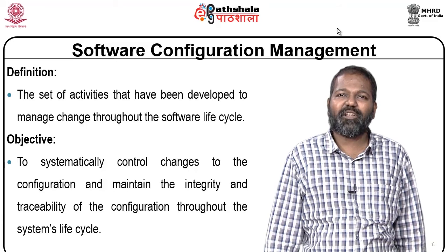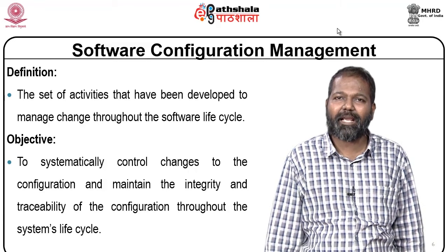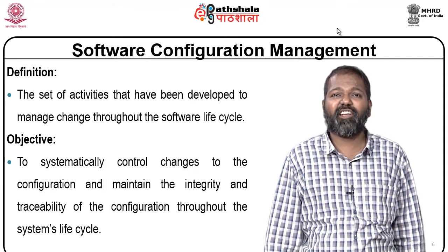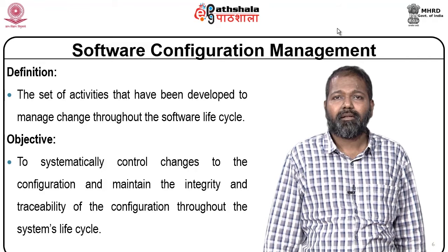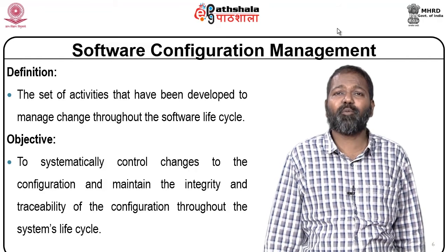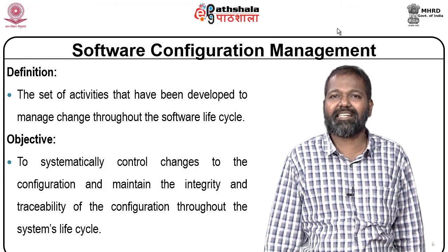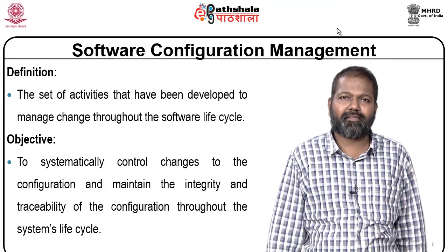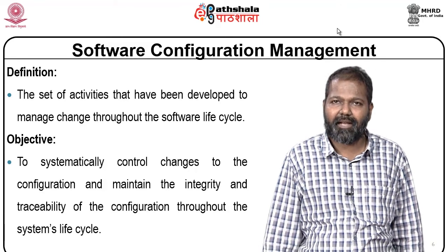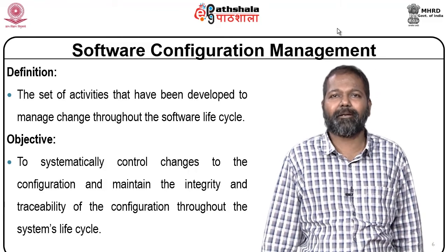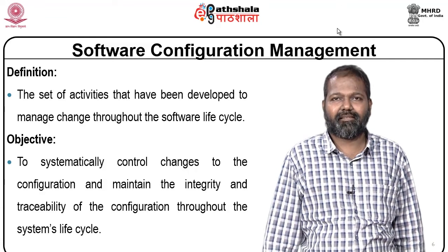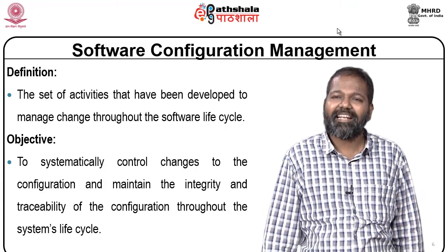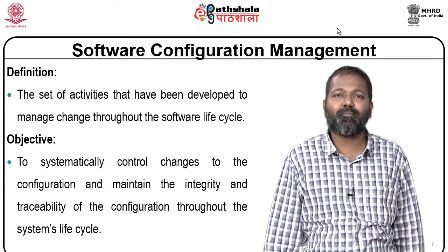Irrespective of which phase we are in, there will be changing requirements. Depending upon the phase we are in, the cost will also have to be estimated for each changing requirement. If we are in the analysis phase, prior to completing the software requirement specification document, the changes, if any, can be addressed easily. In case system analysis is complete,